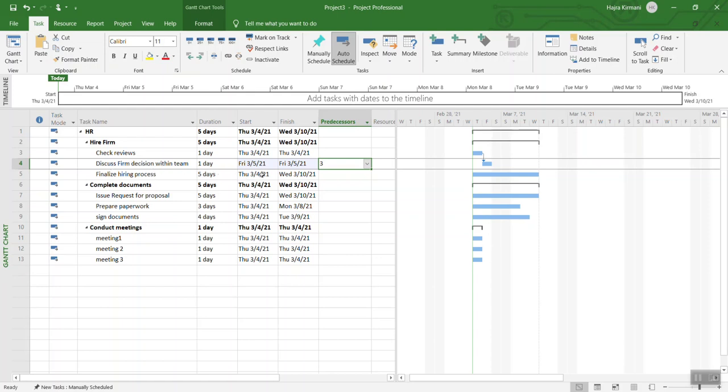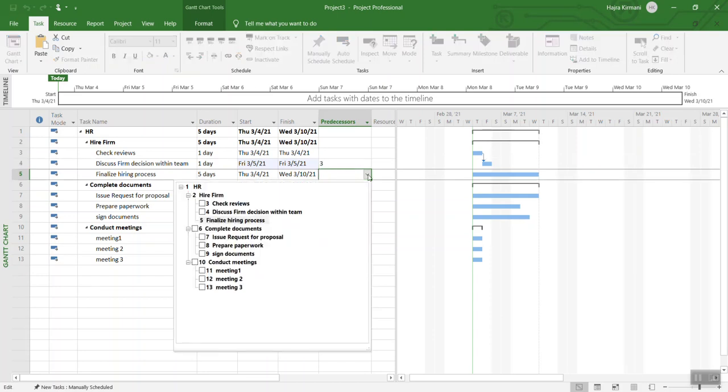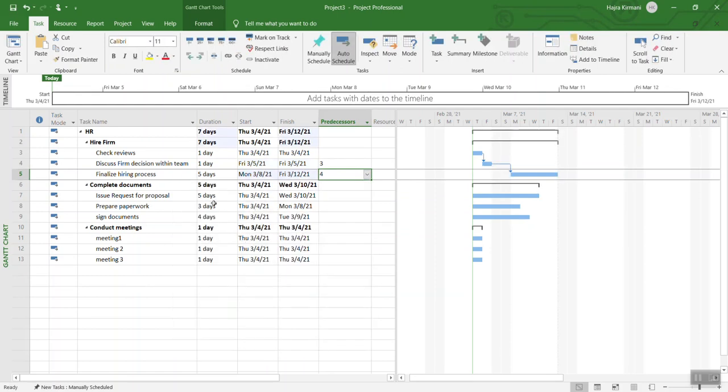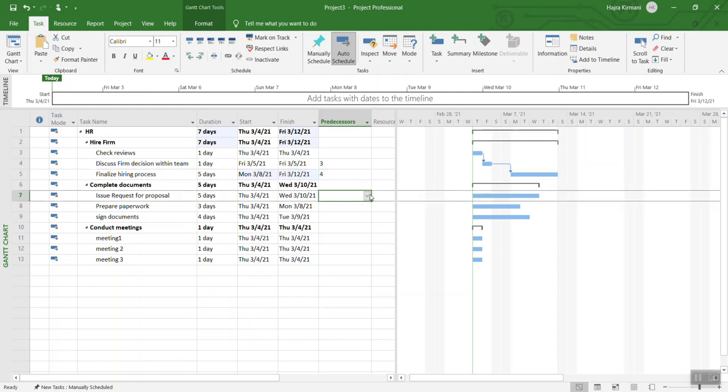Similarly, task number five over here, finalize hiring process, is dependent on discuss firm decision within the team because you cannot finalize anything until you discuss with your team. That's what you are going to do and here is the dependency. Similarly, issue request for proposal - you are going to see if there is any dependency for the request of proposal.